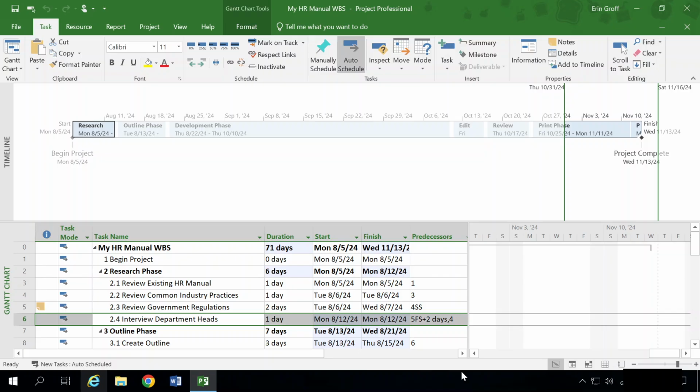The senior attorney in the legal department will be out of town until Friday, August 16th. She will be unable to begin her review of the outline on the 16th as originally planned, and the task has to be postponed. Even if earlier work is completed ahead of schedule, the review with legal department task cannot begin until Monday, August 19th.